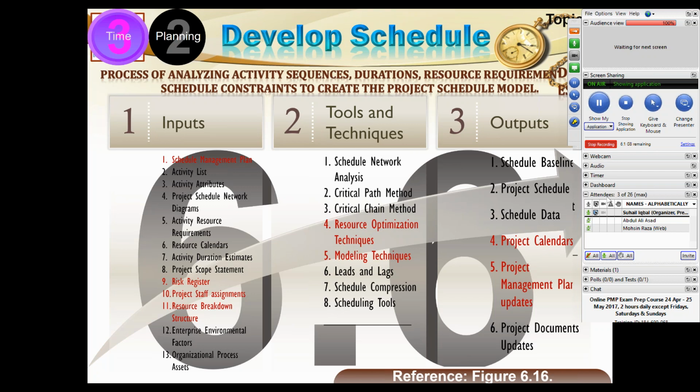If, let's say, the second longest path was 57 days. I have reduced my critical path activities to 54 days, then that 57-day path will become critical. Therefore, that is going to now be dependent on the project buffer. Do you get my point?